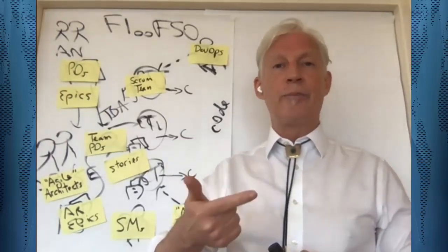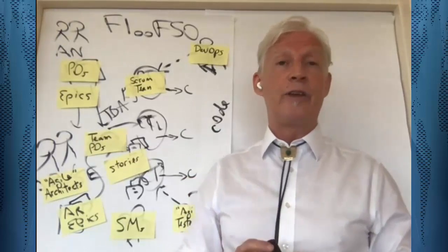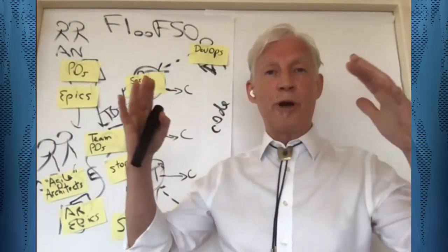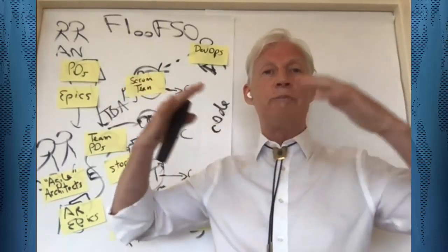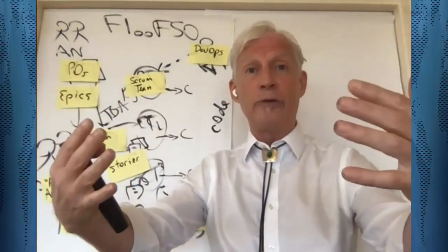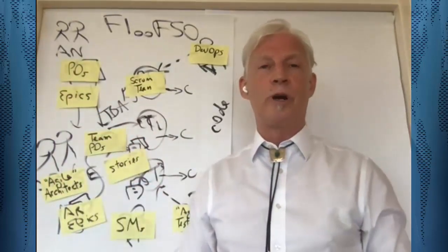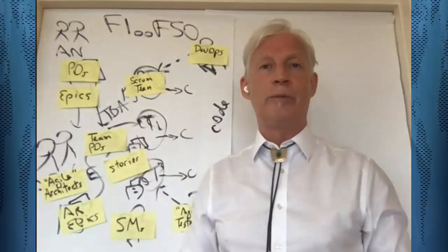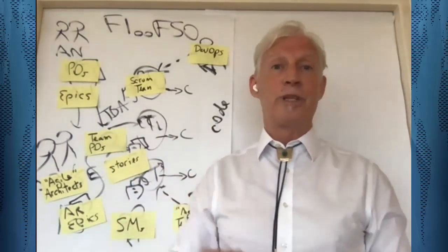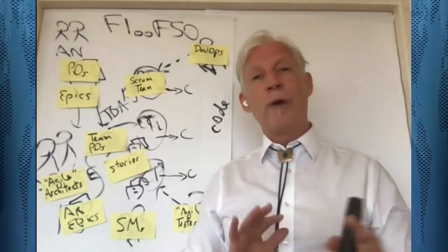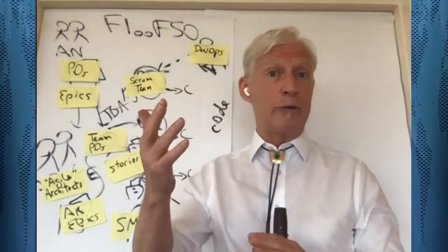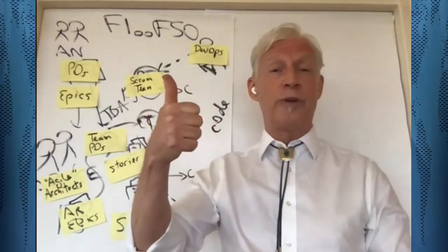And so then bringing this back, and this is a big idea in LeSS, one of the ideas is to move to broader and broader product definitions, where you've got a very big product definition that encompasses hundreds, if not thousands of people within one product, then composed of feature teams. And it's possible to show, as a result, that that's more consistent with adaptiveness and low cycle time. So rather than framing it in terms of good or bad, we can analyze its consistency with respect to some optimizing goal. That's one point I wanted to make.